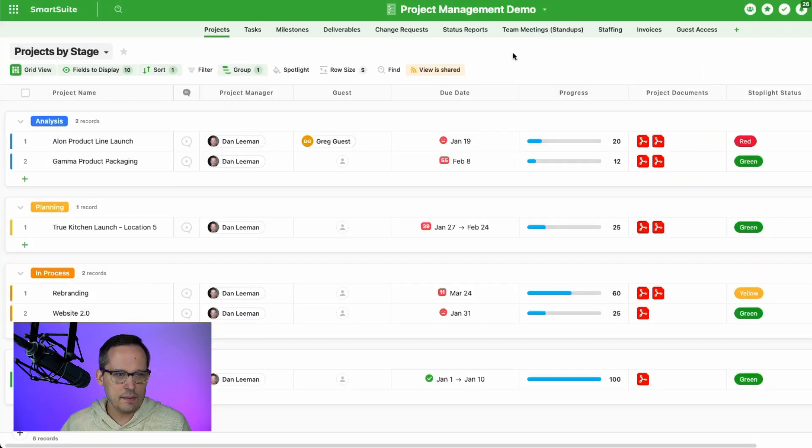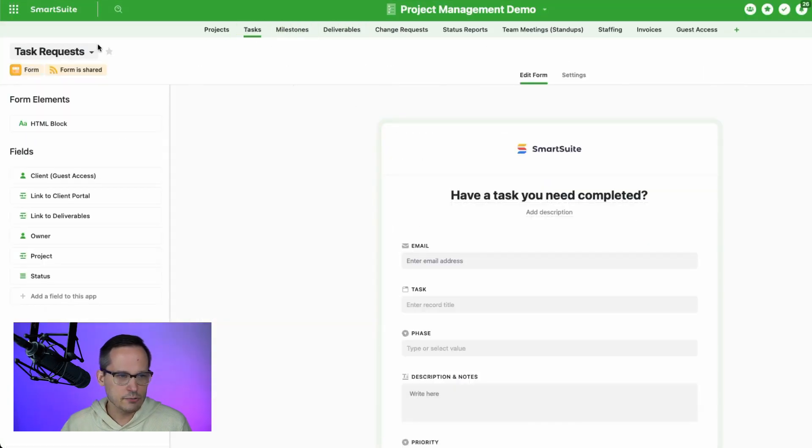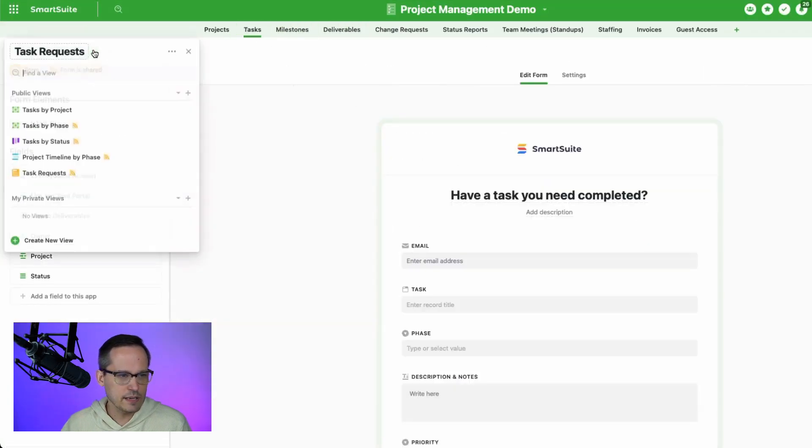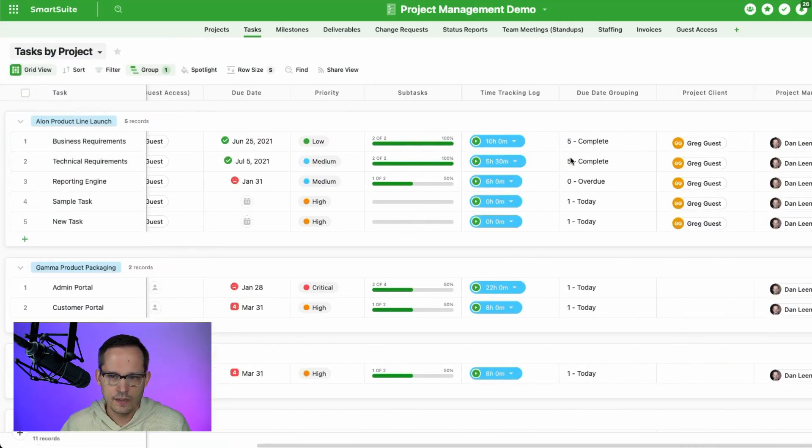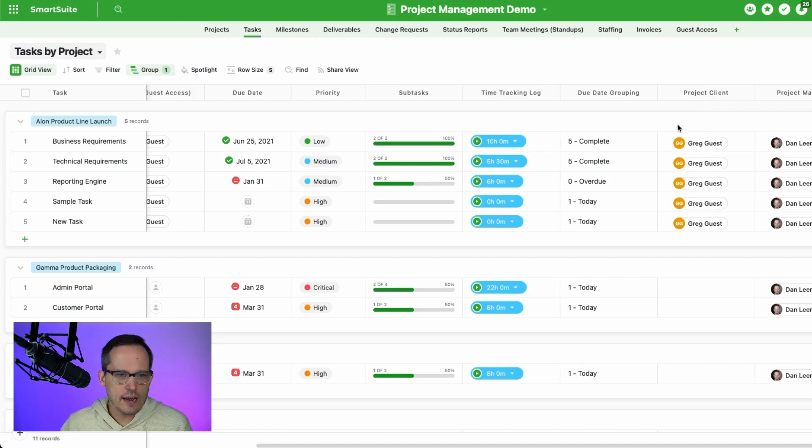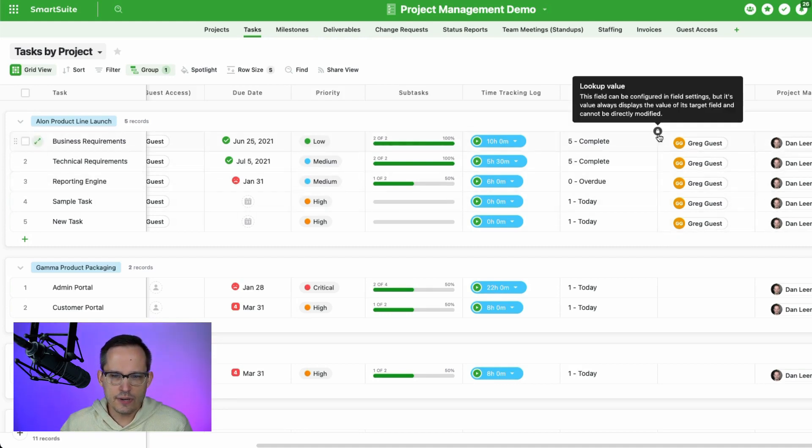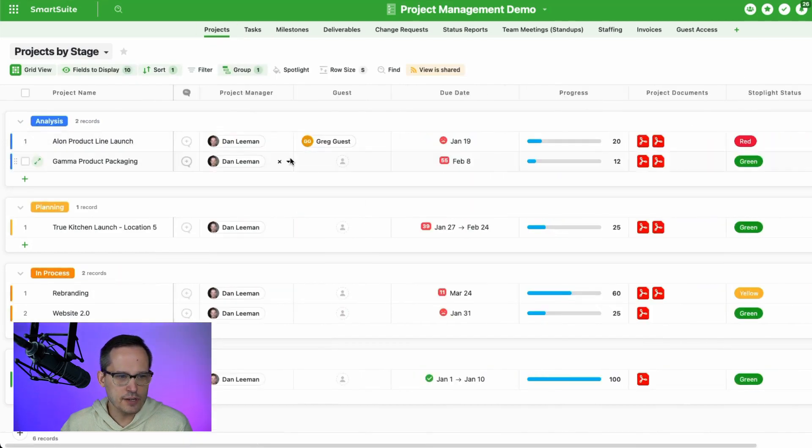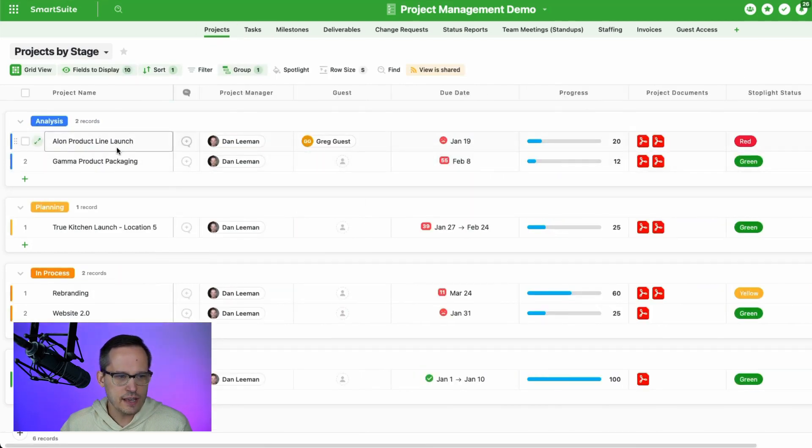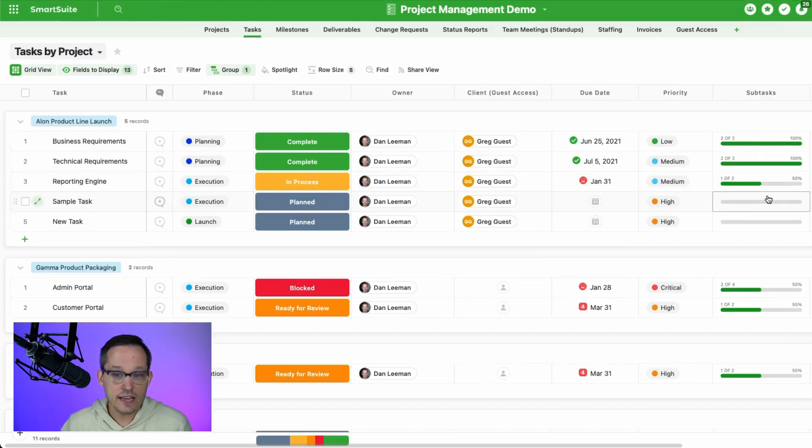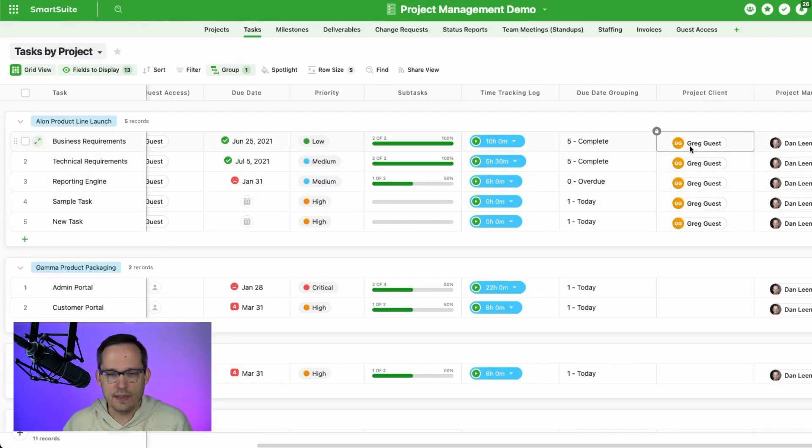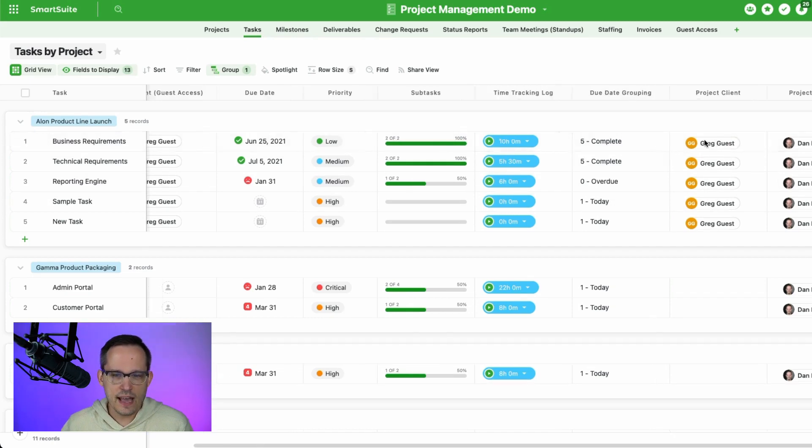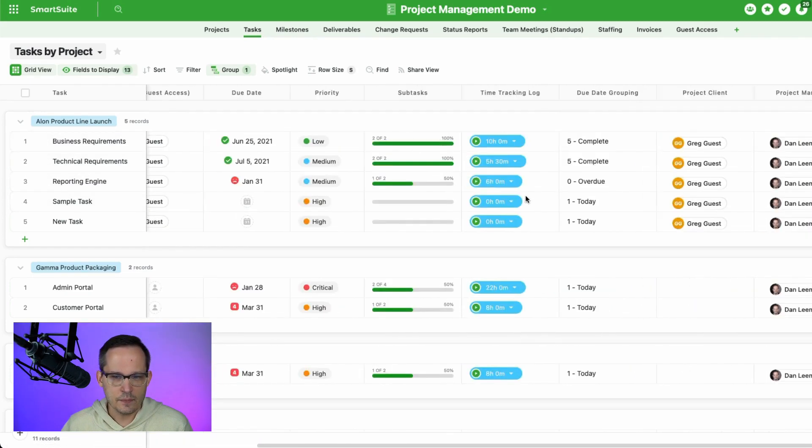But it's basically to say if I'm back here on my task record, and let me get back to my grid view here. Okay, so let's take a look here. We've got on our task, we've got this project client. And what I did is I created a lookup value, where we're taking a look at the associated project, this Elon project product line launch. And we have that guest value here, and we're essentially copying that down, or we're looking up, we're not actually copying the data. And we're going to use that then to make this the client guest access here.